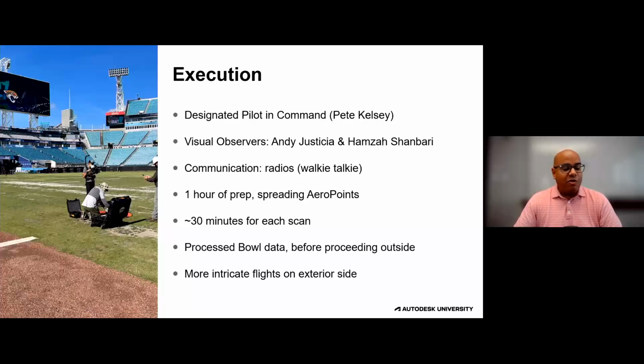And of course, safety is super important. So we spent 1 hour of prep before we even got the drone out of the case, right? Because we're talking about safety aspects. We're talking about what could go wrong, all those risk mitigation techniques and measures that we're putting in place. What would we do if this went wrong? So we had to talk about all of that and sign a piece of paper saying we all understood the risk associated with that and how to mitigate that.